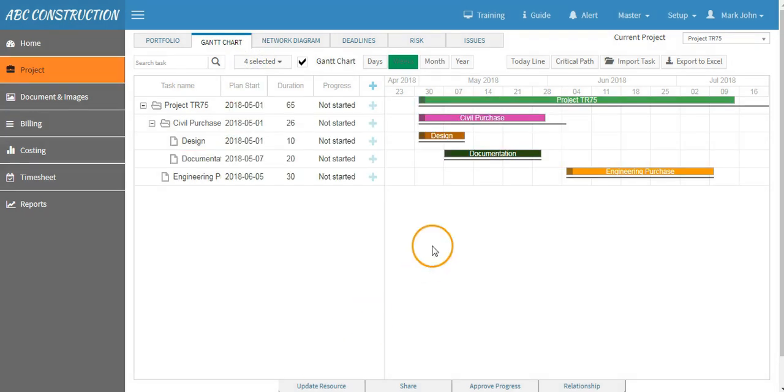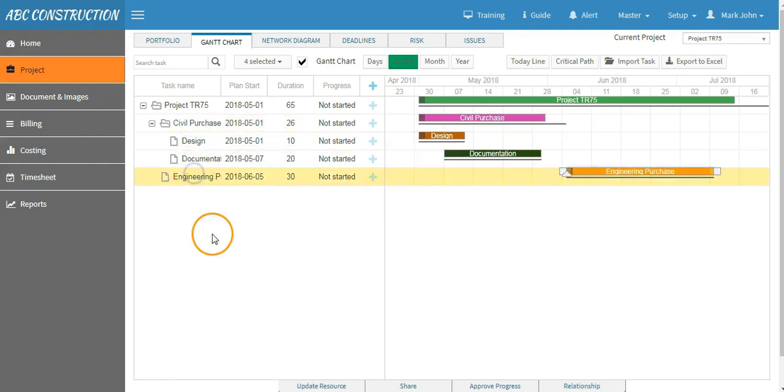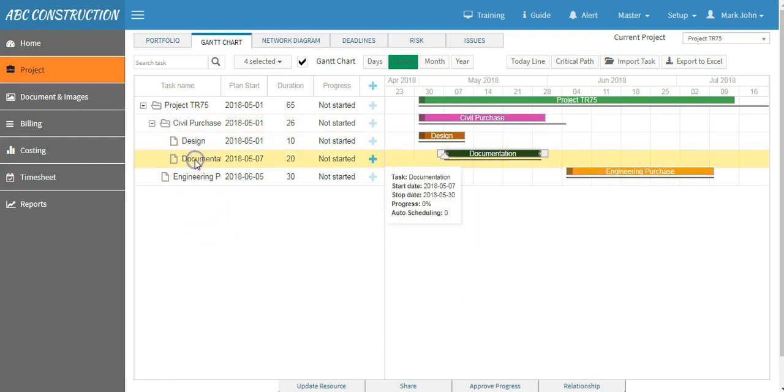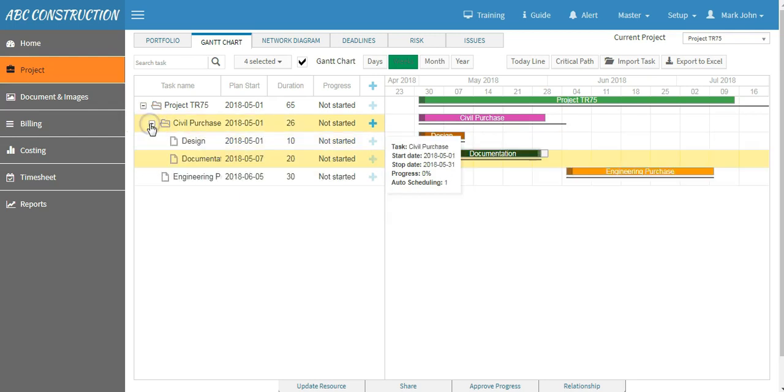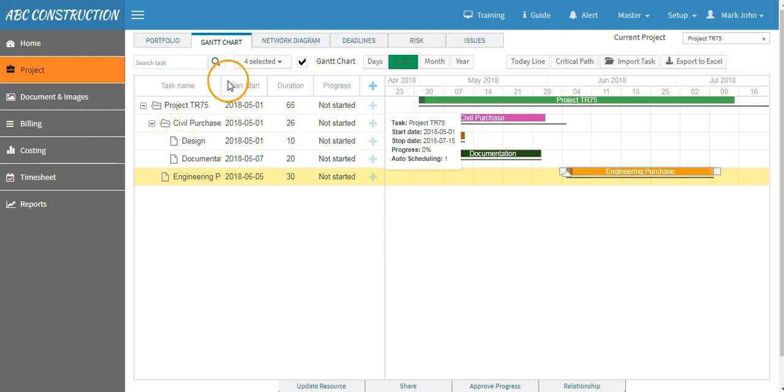As we can see, Civil Purchase and Engineering Purchase are the L1 tasks and Design and Documentation are the subtasks under Civil Purchase. Likewise, you can create other tasks at the required level. We have tasks, plan start dates, duration of the tasks and progress.